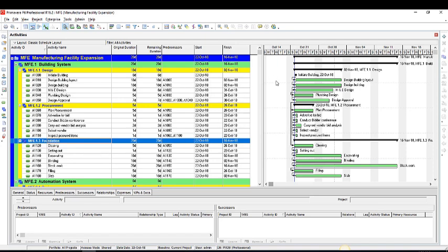Now, however, you may notice that all our activities also seem to commence all on the same day. So once you've created your relationships, the next thing you may now choose to do is to schedule your activities. Scheduling the activities would help in stretching out the relationships on the Gantt, so you see it in a much better format, and then also it will automatically help you to display the activities that you have on your critical path, and then also give you some other very interesting information.